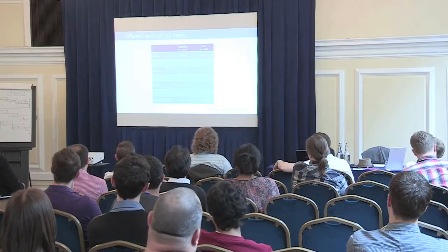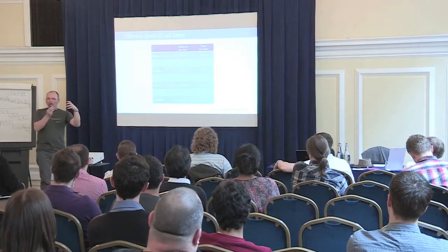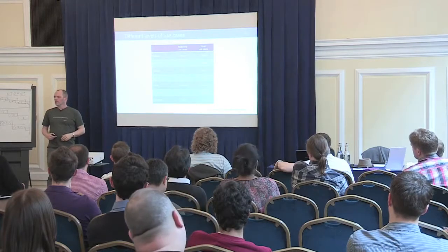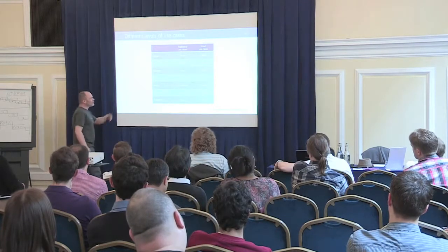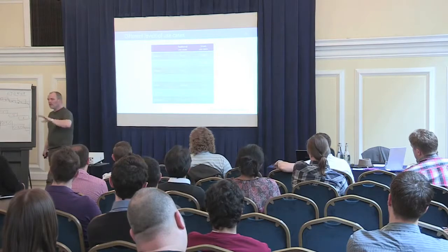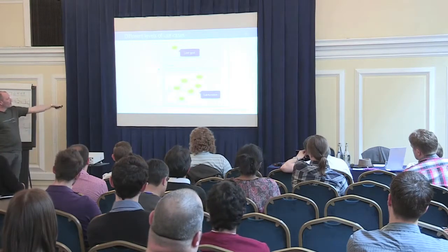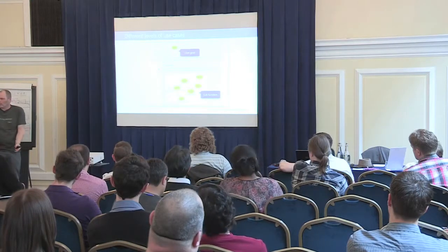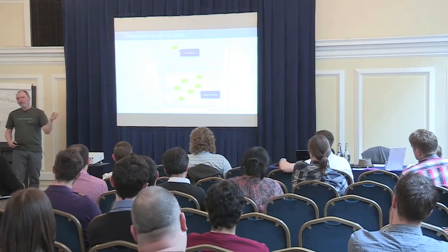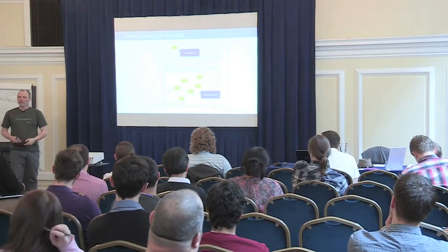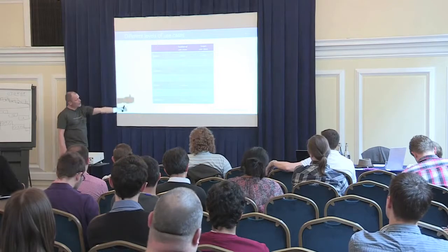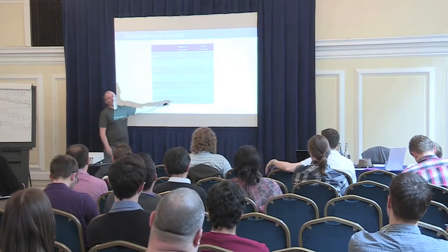And also, it's a unified look at use cases because they're all having more or less the same size. The benefit of that is that you can estimate them at a single linear scale. So estimation becomes, well, fairly easy to do. Also, it's a good unit of work in Agile projects. And an important thing, something you do not have with user stories, is that you can identify reuse. For instance, this little oval here says search customer. If you are building a call center application or a call center system, whatever you might call it, well, a thing like search for a customer will appear in multiple diagrams, right? And you only build it once and you reuse it all over again. So you identify functional reuse early on in the project. And again, it's more traceable. It comes from the business goals down to the functionality you're building. And it is also much better testable. I'm going to show you that.